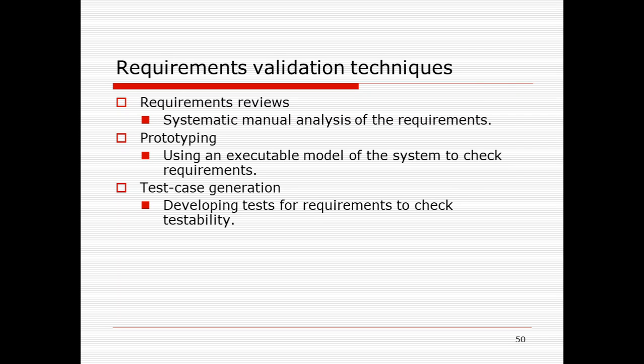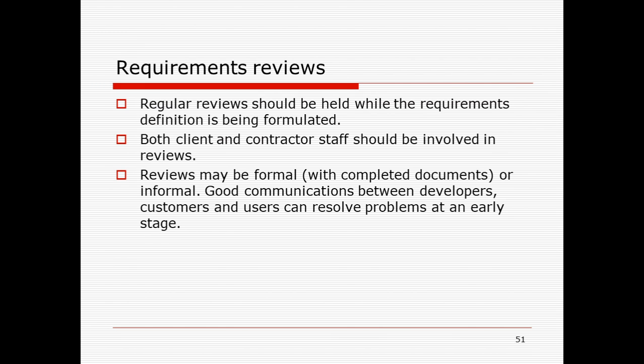So it can be done through prototypes. An executable model of the system to be developed can be built for a particular specific category only, for checking the requirements, and then that can be verified. Then test case generation: developing test cases for the requirements to check the testability. You can generate the test cases to check whether the requirements are testable or not. So these are different techniques through which requirement validation can be carried out.